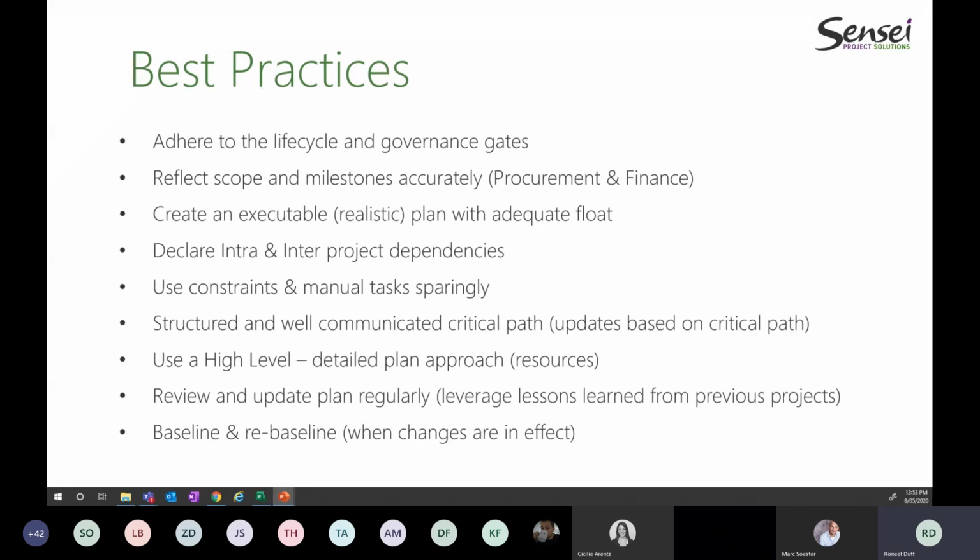If I have a project that is dependent on the sales project, then I should be talking to her regularly and just figuring out how her plan is doing. Specifically when you've got projects that have dependencies in flight. So when half of her project is complete, then my last third of the project can commence, because you're then committed to the flight and you need to figure out the best way forward.